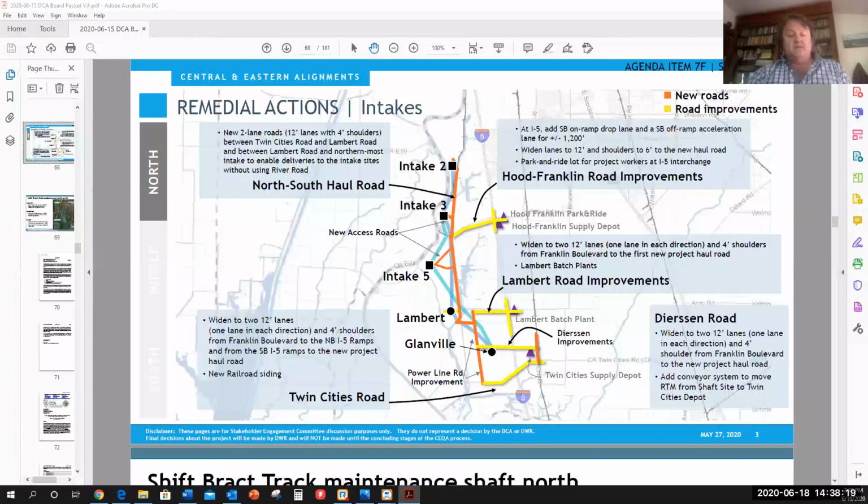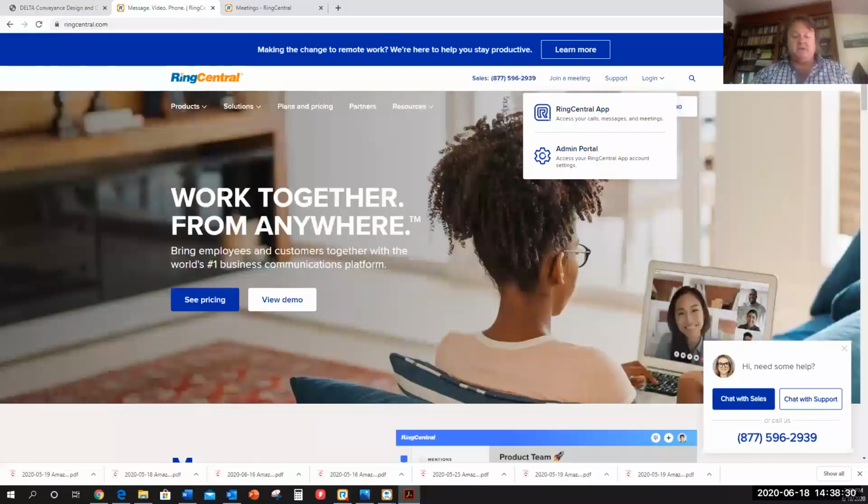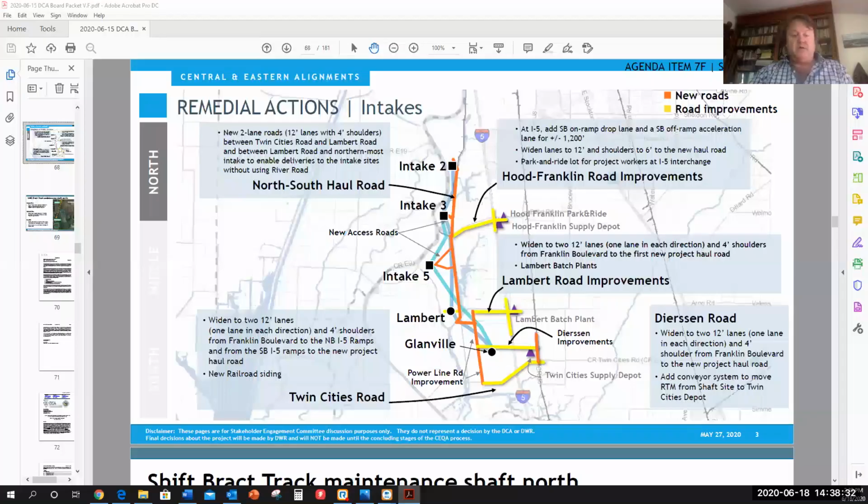If there was an urgent need to move things to and from the intakes in the winter, trucks could use the river road. And given the great inconvenience this would create for locals, such usage should only be for emergencies, which means that timing peak construction during the summer months would be a good idea and would help reduce negative effects to both wildlife and local communities. The issue of truck traffic need not be framed as a choice between impacts on local communities versus impacts on wildlife. We can try to address both of them completely.